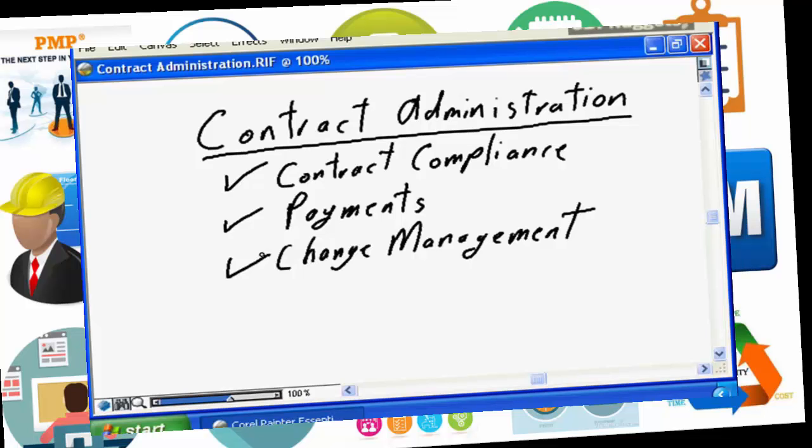So back to the scenario that I described earlier, had I executed change management, and had I executed the change that says status reports will no longer be weekly at noon, status reports will be biweekly Fridays, there would have been no cause for termination with cause, and if the customer had wanted to terminate the contract, there would have been penalties for early termination.